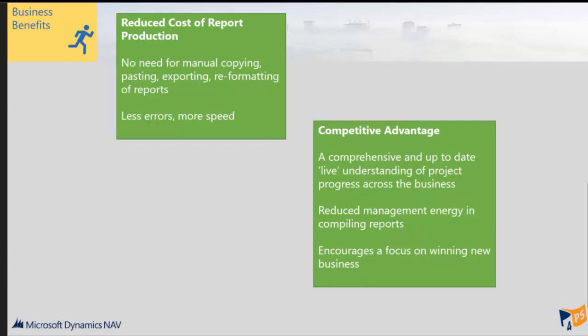So if you're not actually looking at your projects at the moment using an element structure as you go through them, we're hoping this will allow you to have a greater depth of analysis of your project. So as I said before, you can easily see that you've used up half of your subcontract labour budget in terms of hours or amount. That's great. If you can then look at that and say, well, actually, we've used up half our subcontract labour hours, but in phase one, we've only 25% completed it, and phase two isn't complete at all, it gives you a much richer feel for where you actually are in that project and to highlight risks in that project at a much earlier stage than waiting for the budget to run out and then realising that you're not far through the project.